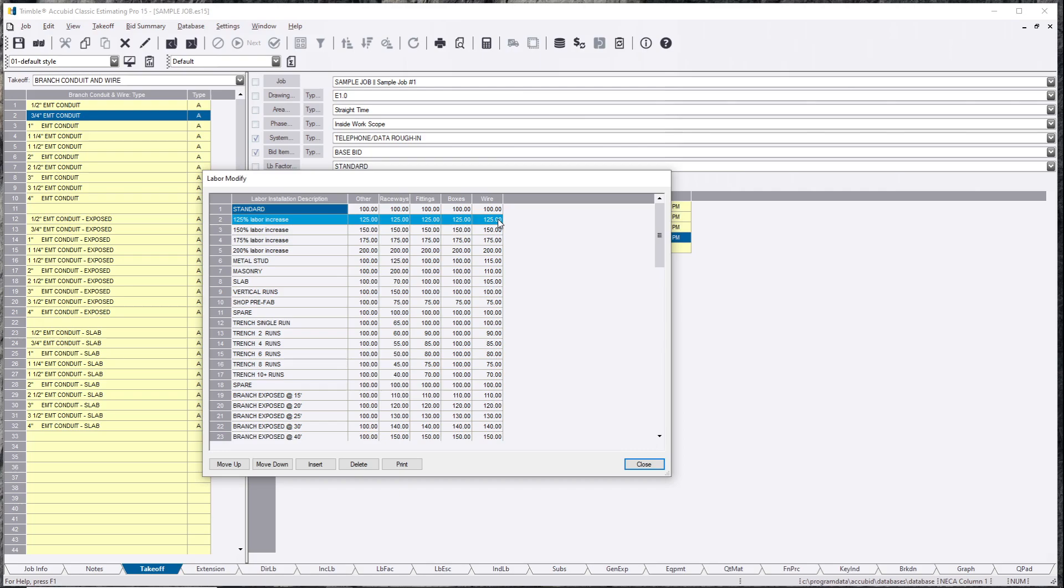Why would your wire be so much harder to pull? I disagree with that. I would say your conduit, your boxes, and your fittings would be much harder. Your wire might not have an impact unless you're going to have to spot a box every maybe 20 feet versus every 100 feet, so you don't have these nice clean straight runs you can pull from. Yeah, I would probably say you might want to up that a little bit, but in this case, many ways you can do this.